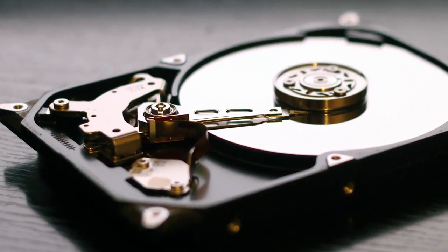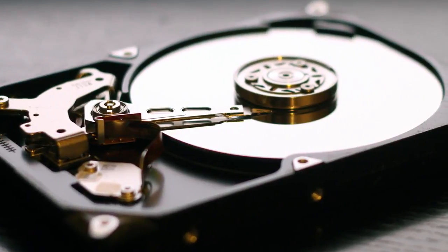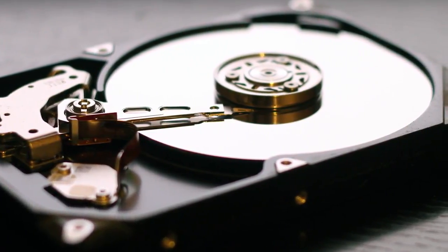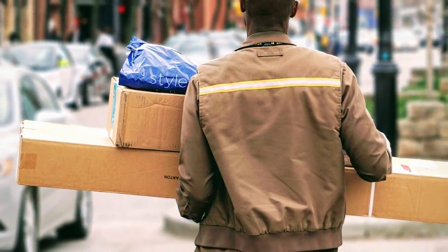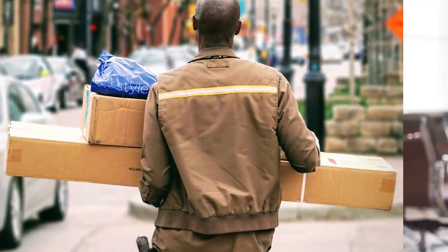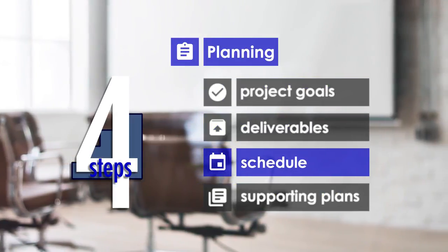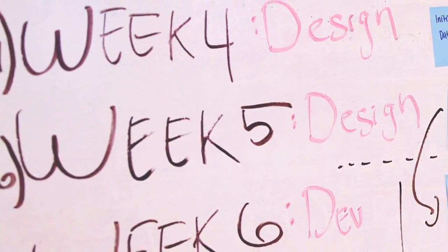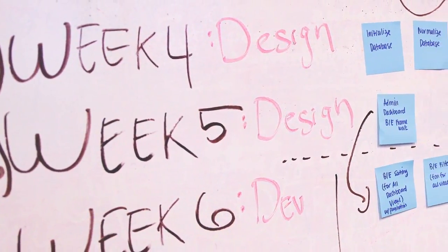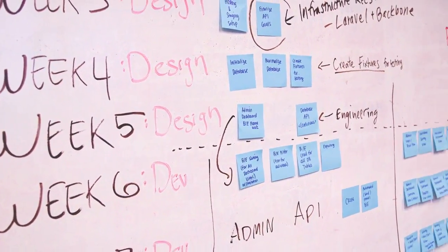A deliverable can be a software product, a design document, a training program, or other assets required by the project plan. Document the deliverables in the project plan and estimate when and how each item must be delivered. More accurate delivery dates will be established during the next step, project scheduling. Step 3, schedule. In this step, you will lay out the course of the project in a logical manner from start to finish and assign personnel and due dates to major tasks.